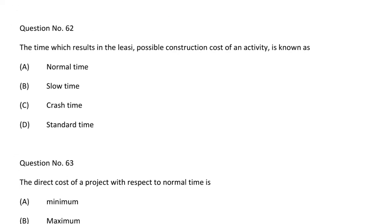Next question: the time which results in the least possible construction cost of an activity is known as — option A normal time, option B slow time, option C crash time, option D standard time. The correct answer is option B, slow time.